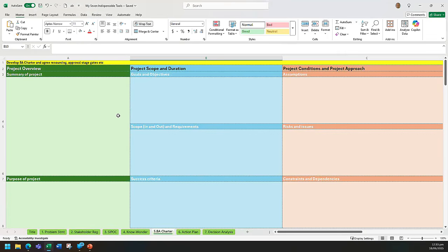Then we found we could more easily manage the project, and we were able to sit down with those people and agree: this is the charter, these are the deliverables, what risks do you see, and actually work through it with them, which minimizes surprises. It's a great way to not just break down the work into logical categories, but to allocate work. It makes the scope of a particular stream much more understandable: the purpose is this, this is what we're trying to achieve, these are the specific risks and the assumptions we're making.